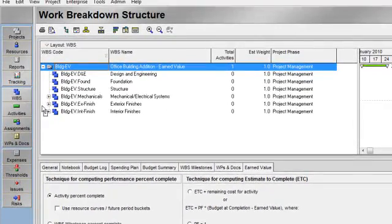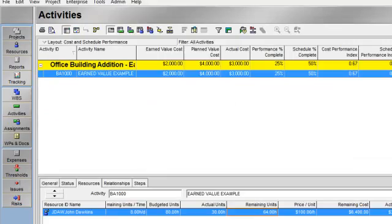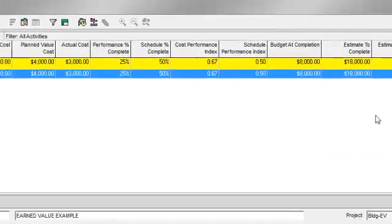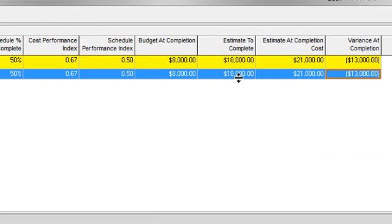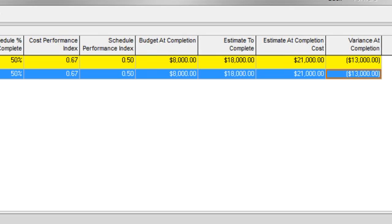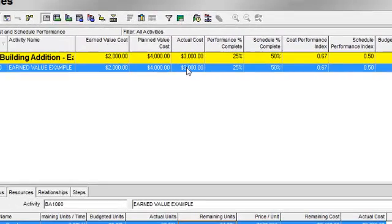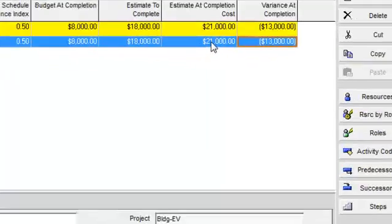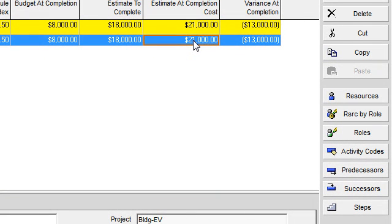So now when I go back to my activities window, I'll see that my estimate to complete is now reflected as $18,000. And when I add that to my actuals, I end up with estimate at completion of $21,000 and a variance of $13,000 in the negative.